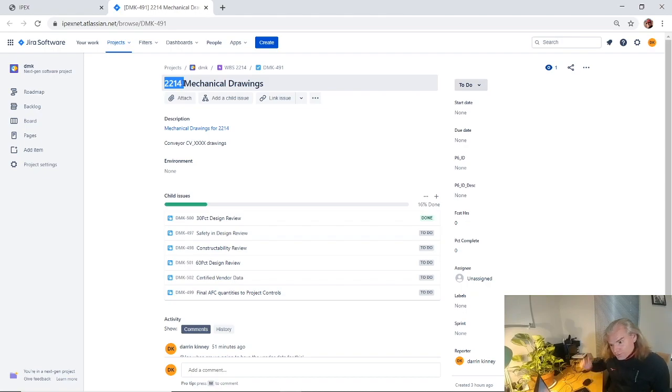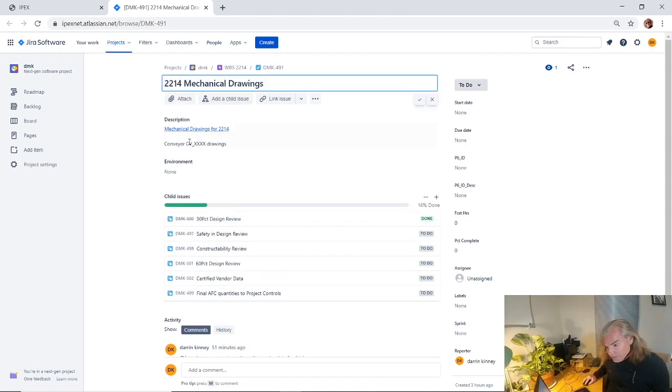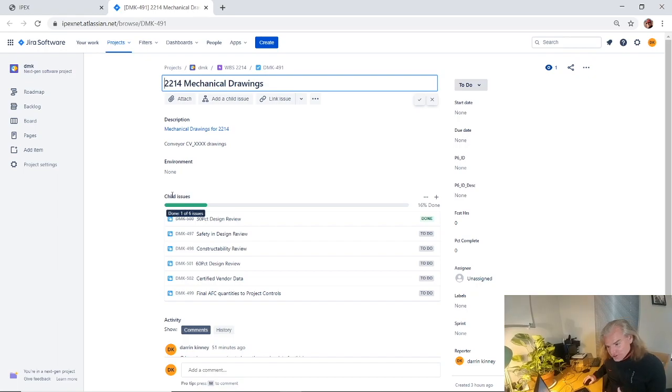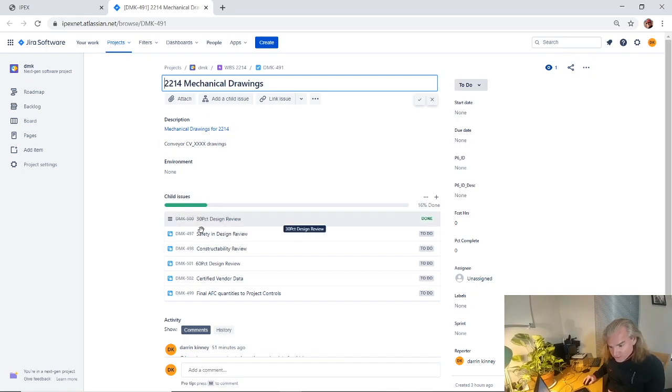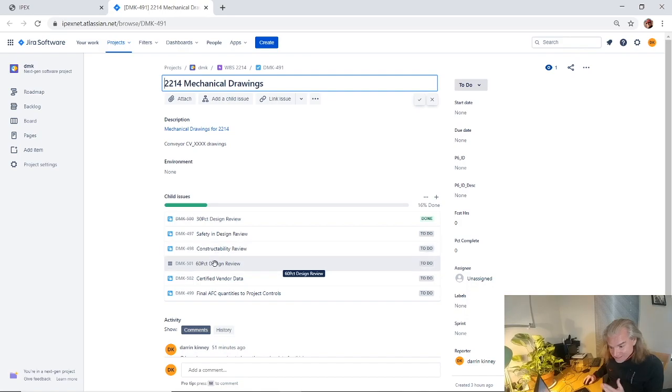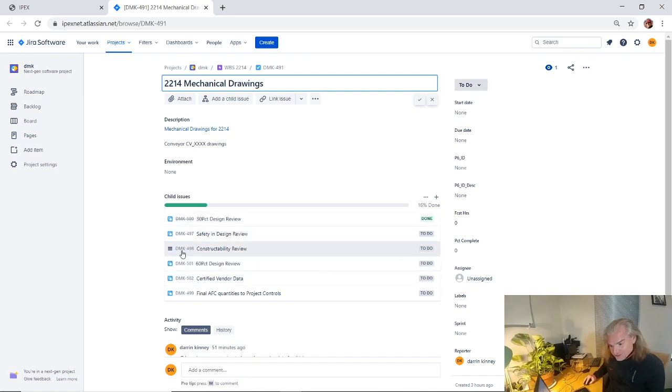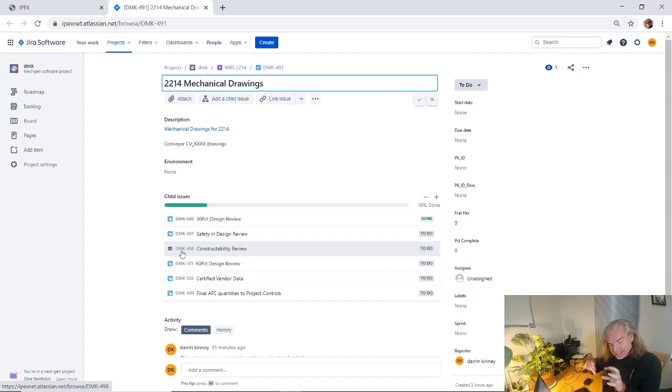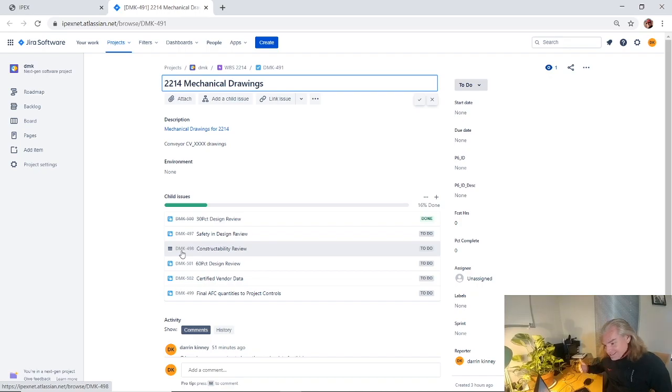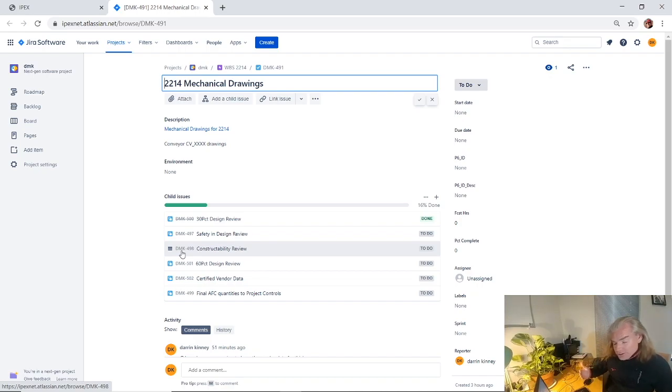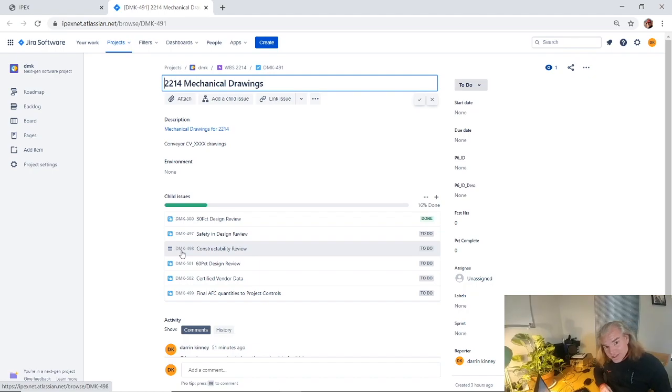Now we can actually put some commentary and some discussion. We can actually link some additional issues, maybe the 30 percent design safety and design reviews, a 60 percent review, when we're going to get our vendor data. These are actually tasks that you have to perform, and you can actually have your engineering team directly manage this level of information inside JIRA. Now you sometimes put all this information in schedules and schedules get unwieldy and hard to update at these detail levels.